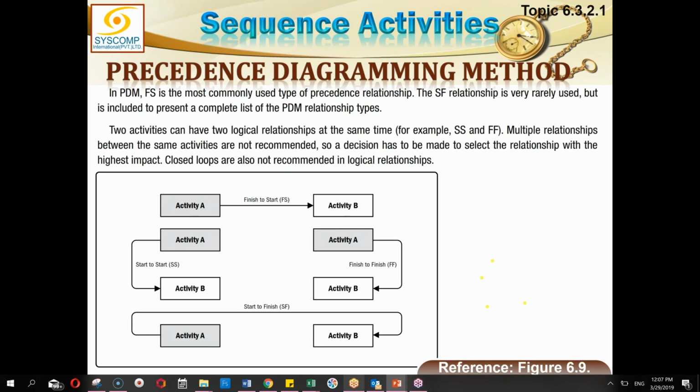I have a start to start relationship, so that from that corner I can engage the other guy to start polishing those tiles, or woodwork or marble. So in this case it's a start to start with a lag of, for example, 2 days, so that it can be in the right shape to be polished. And then at the end of the floor it would be a finish to finish as well, because once the end is finished, even after 1 day, it is going on in sequence. So will it be start to start and finish to finish, or am I missing some point?